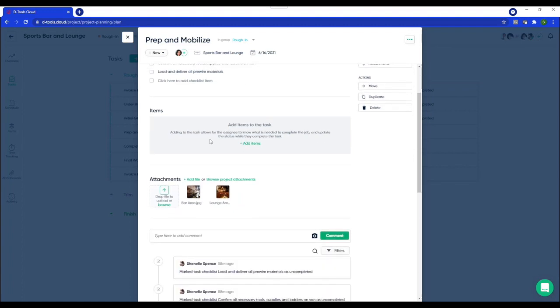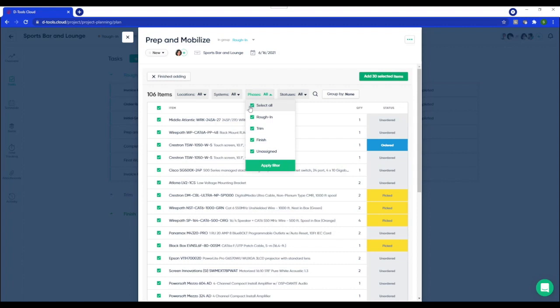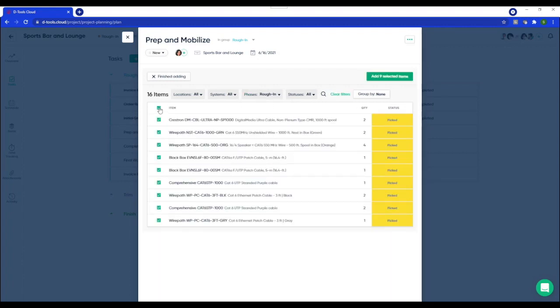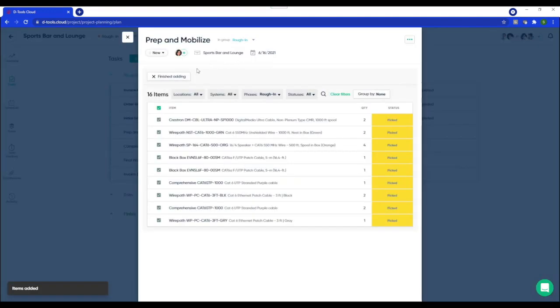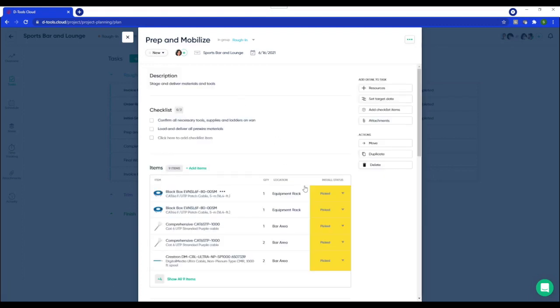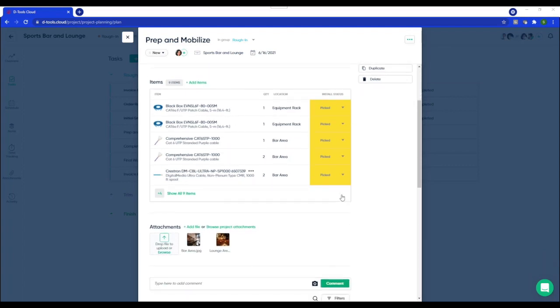And then in the items section, this is where you add products from the project to your tasks. Some may call this a pick list. And it's really nice because the entire bill of materials is going to come up and you have a number of filtering options. I'm going to filter by phase since this is a rough in task. And I'll select all my products and click finish adding to add them to my tasks. So this is really nice because now your technician knows exactly what's needed and can update the status of these products from the field. So keeping them organized while bridging the gap between field and the office.